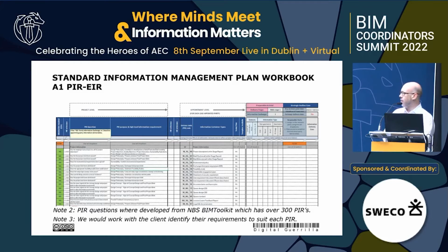A lot of clients really struggled, because they know what they want, but they don't know how to ask questions, or they don't know what their internal review processes are. So that's probably one of the biggest challenges we found in implementing SIMP: trying to get clients to understand what their actual review process is. What do they actually need to sign off? Because as we know, a lot of clients don't want to say they approve information. They mostly just say there's no comment, so there's no legal ambiguity there. So there's quite a few things we need to work through in that as well.